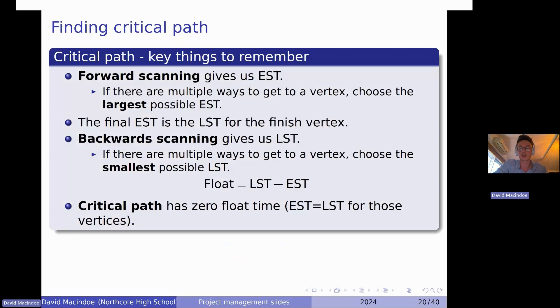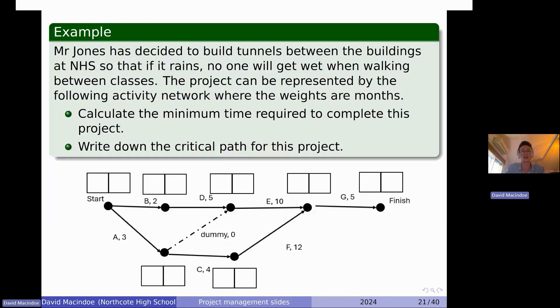Okay, let's do one. I think this is really the critical way to learn this stuff. So we've got here the principal at a school is building tunnels between buildings so that if it rains, no one gets wet. We can represent this as an activity network. First, it asks us to calculate the minimum time required to complete this project. So that's going to be the EST, the earliest start time for the finish. Once we're at the finish, we're done. So let's just kind of work along. At the start in this leftmost box, we just put zero. And as we go along this edge here, duration of two, so we're adding that onto the EST for the start.